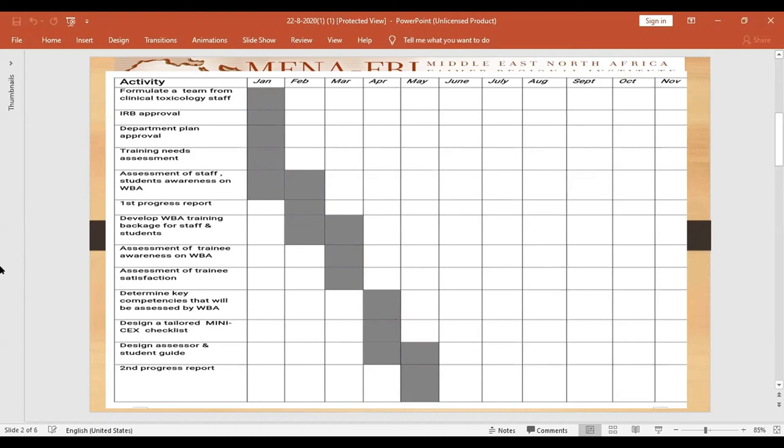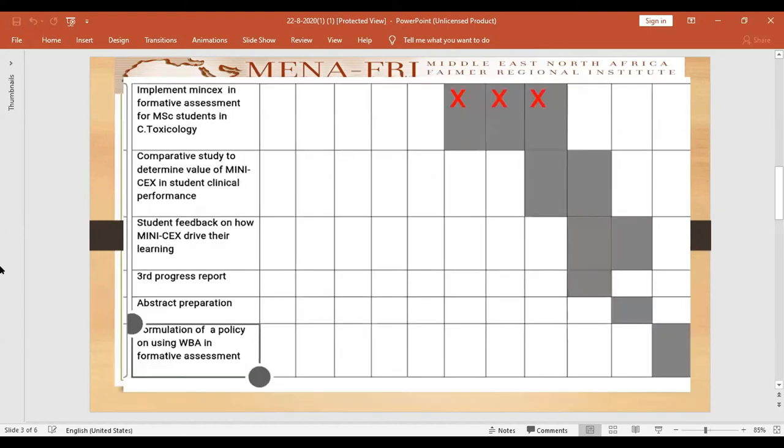Following this, we designed an assessor guide to be submitted to the department staff members to guide them during using mini-CEX as a formative assessment. This was done until March or April. In my project, we planned to implement mini-CEX during June before the summer exam.